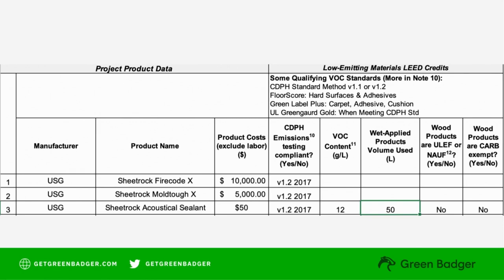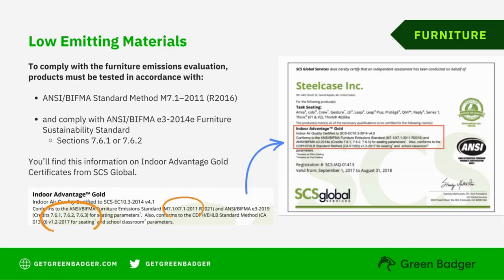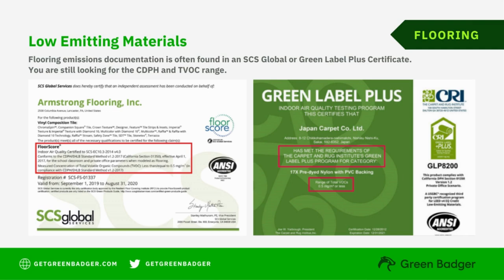We also need to show the volume — how much sealant do you intend to use on the project? Other examples of low-emitting certificates include Indoor Advantage Gold certificates, SCS Global FloorScore, and Green Label Plus, which is very commonly used to certify carpets and carpet adhesives. These certificates also show that the product meets the CDPH testing standard and show the TVOC range.